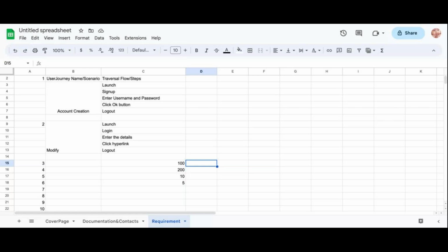Suppose those changes are important, they did the changes, but definitely your script will fail, right? Again you need time to redo this particular flow, this particular flow, this particular flow. So you need additional effort for scripting, right? Suppose they did some changes in code, definitely it will impact your scripting, so you need more time for the executions.